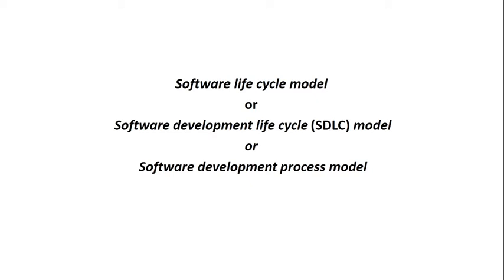So this is what the software development life cycle is. We won't be developing the complete software at one go altogether. What we'll do is we'll divide the entire task of software development into smaller tasks or phases. And in those phases, we will be carrying out that smaller task or subtask. And then a review is carried out after each phase, like exams, so that whatever work is assigned is being completed, it is completed correctly, and it is completed within the given constraints of time and cost. This is the reason why we carry out a review.